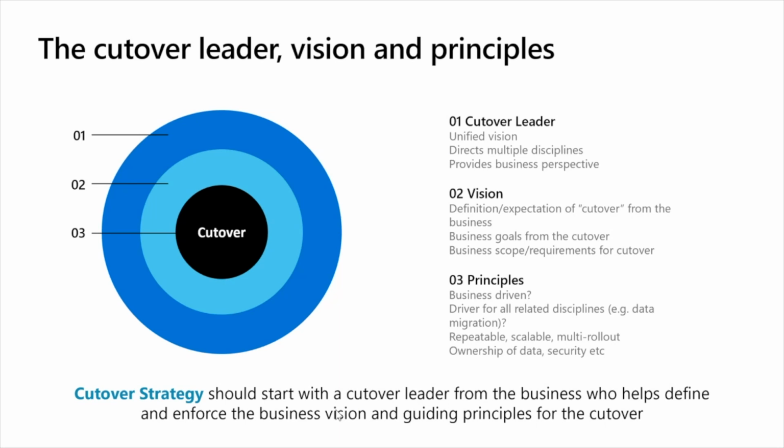The second thing we'd recommend is to think about having a vision for the cutover as part of the initial cutover strategy. And this is in the initiate phase, right? It's right at the beginning of the project. So you're defining what is it from a business perspective you're expecting to get out of the cutover, right? And not just the transition, but in a bit more detail. Are you going to be expecting your system to get decommissioned, or is that a separate project? Are you expecting to be able to use the data from the legacy system to compare with the new system? Are you going to want to do year-on-year comparisons? What is it that you're expecting, right?